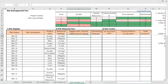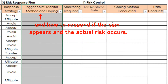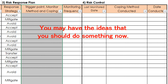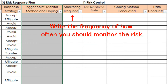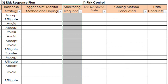In the next column, clarify the trigger point, which is the sign of each risk: name who will monitor it and how, and how to respond if the sign appears and the actual risk occurs. Because of this planning, you may have ideas about things you should do now — if so, do so. Then write the frequency of how often you should monitor the risk in the next column. After writing this for all your risks, planning is complete.